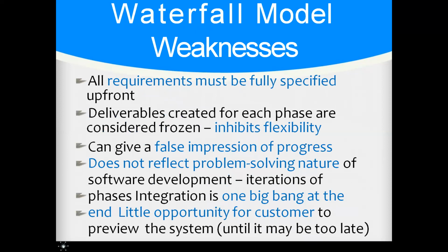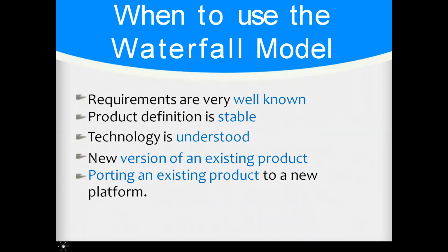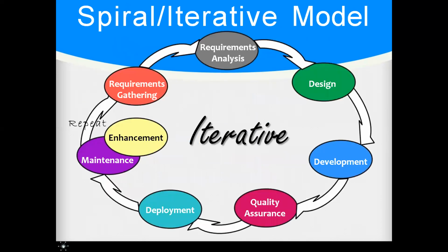When to use the waterfall model. Requirements are very well known. We can always document requirements. Technology is understood. New versions of an existing product might also be a reason for us to use it. And porting an existing product to a new platform might also be a reason for us to use the waterfall model.